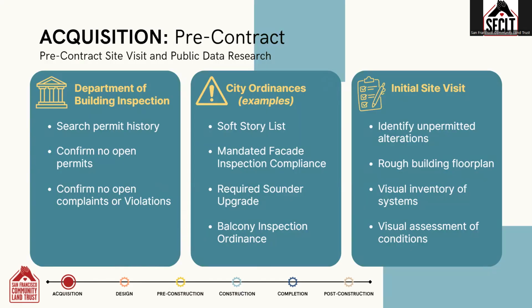The acquisition phase starts with what we call pre-contract, before an offer has been made on a property. In this very early stage, the construction manager is performing initial due diligence on several potential properties in order to assess the overall property condition and set early rehab assumptions. This is a research stage that is critical for identifying all items to be included in the rehab project and for uncovering potential impacts on the budget, timeline, and design.